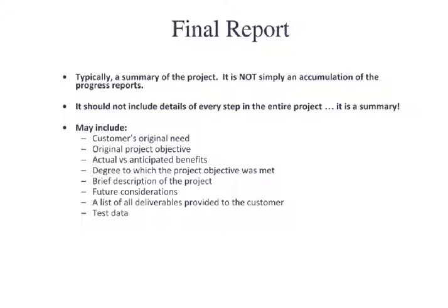What it is not, however, is simply an accumulation of the past progress reports. So you don't simply say, well, this week we did this, this week we did this, this week we did this, and call that a final report. The final report needs to be written separate from the progress reports and needs to tell the story of the project at a summary level.